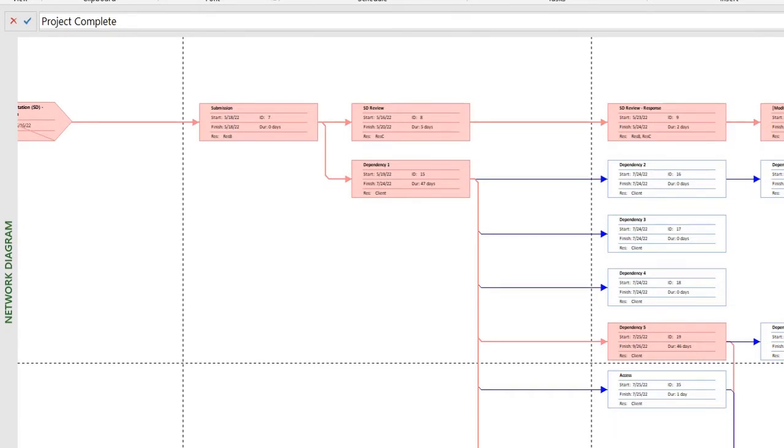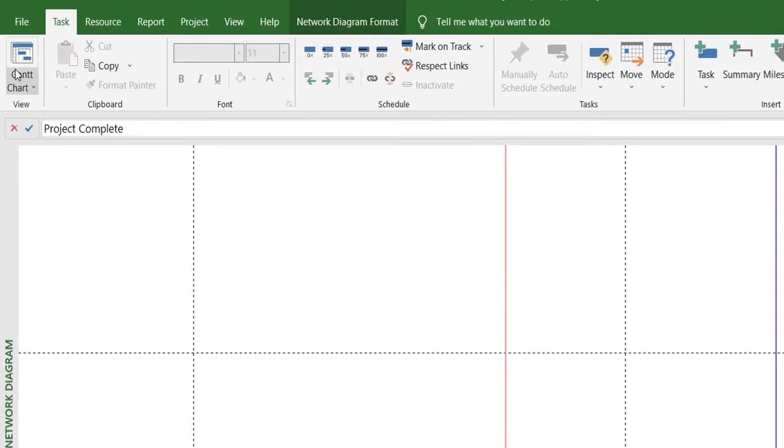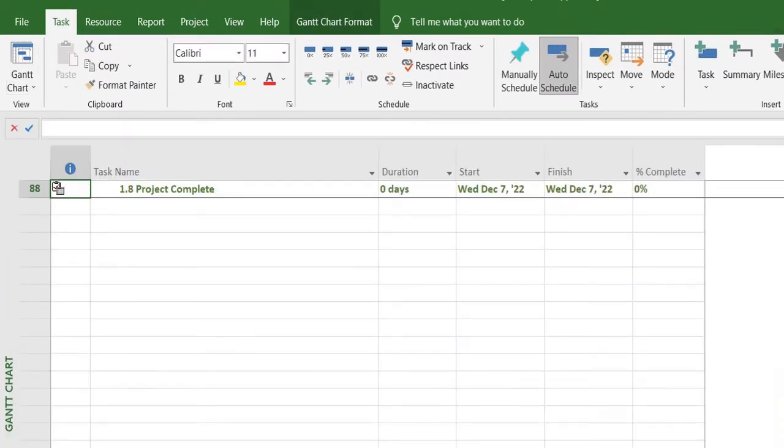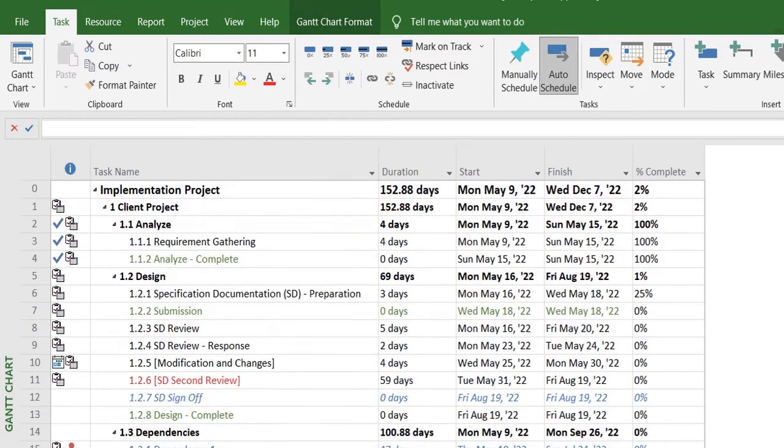So any task can become a critical task with the passage of time, or any critical task can also become a non-critical task, depending on the dependencies and the dynamics of the project. So that's one way of seeing it. Let's go back to our chart.